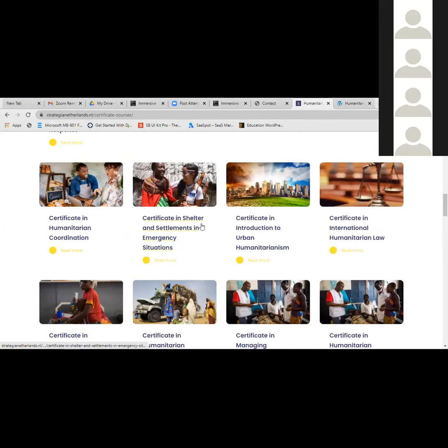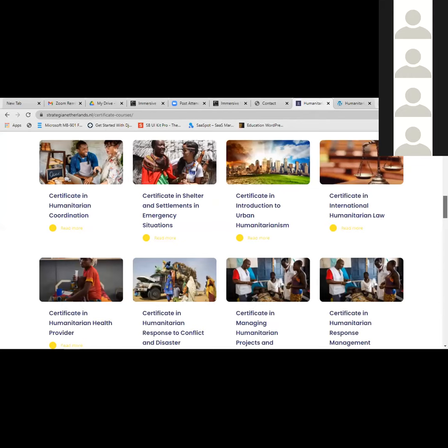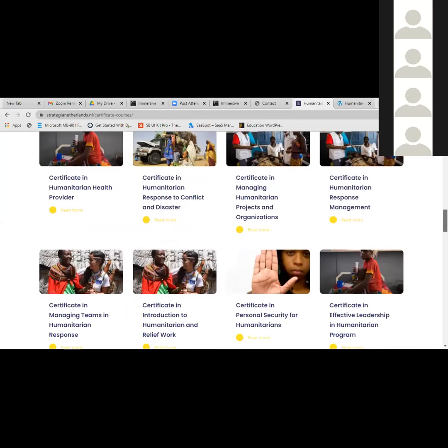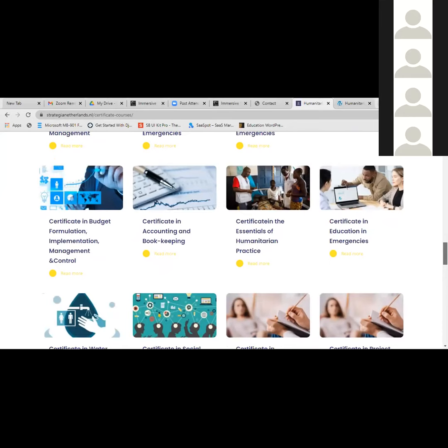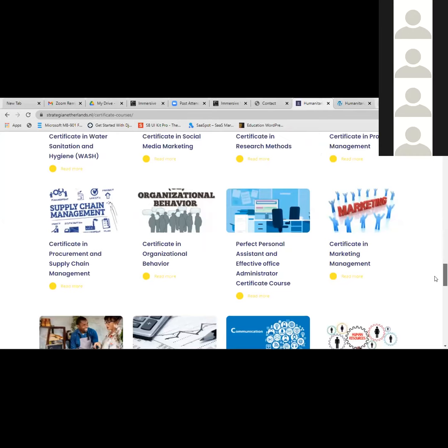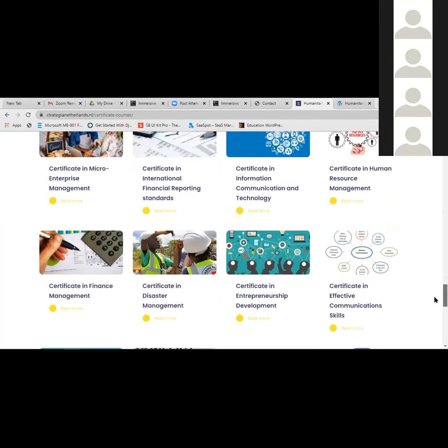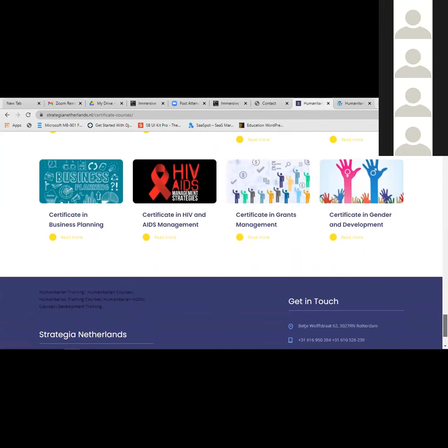But if you're doing the other part, which is the reactive grant proposal process, then here you will be tracking and finding out whether organizations have actually been able to release some requests for proposals, and you will be able to sit down and consider a proposal, prepare a proposal, submit a proposal, and now the grant management life cycle will take place, as we said, where we have pre-award, award, post-award, and closeout, and also the audit process for the grant award.